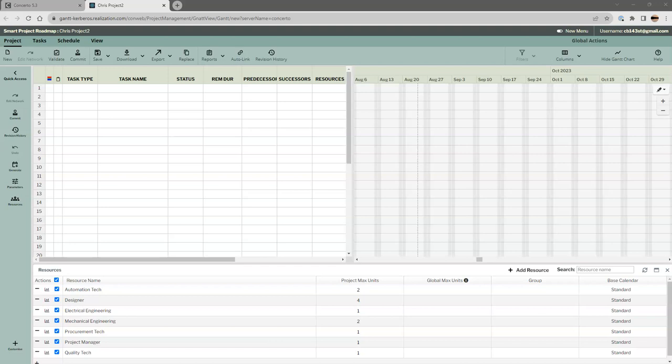So those might be your primary phases. In a maintenance, repair, overhaul type environment, the phases might be a bit different, where you do induction activities, then disassemble the piece of equipment, you inspect it, you repair it, you reassemble it, and there may be some parts repair as well in larger organizations like an airframe repair overhaul facility. And then they move into test. So those might be the phases for a smaller project.